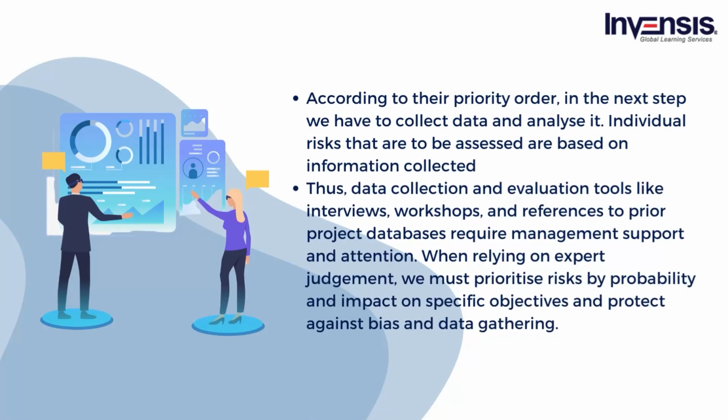In the next step, we have to collect data and analyze it. Individual risks that are to be assessed are based on information collected. Therefore, data collection and evaluation tools, including interviews, workshops and references to databases of prior projects, require management support and attention. In addition, it is important to protect against bias in data gathering, which is important when relying on expert judgment. Then we have to prioritize risk by probability and impact on specific objectives.